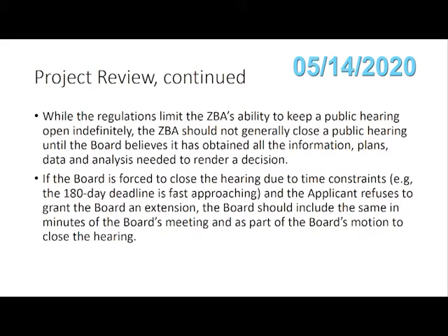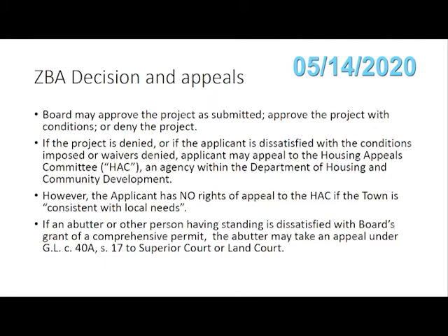But an applicant that files a project with the Board of Appeals before the Board of Appeals touches it cannot claim the project is uneconomic. In other words, if on day one I file an application with the Board of Appeals and on day 180 the Board of Appeals doesn't impose any conditions or doesn't require any reduction in density, the applicant does not have an uneconomic argument. So the order of conditions, to answer the question directly, Angus, no, because that is not the fault of the Board of Appeals.